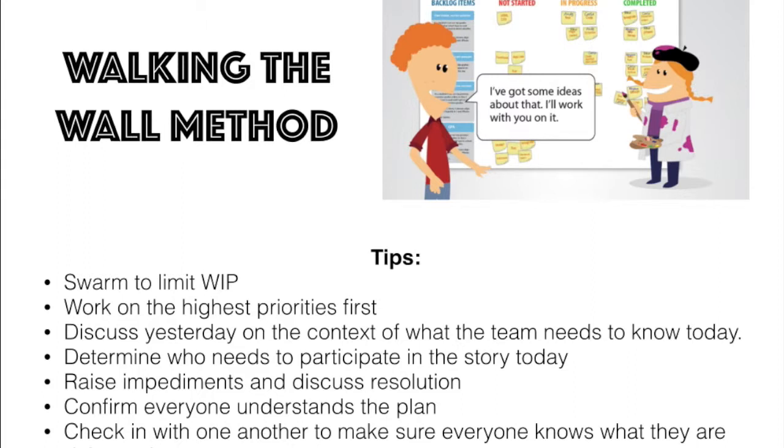And by limiting your work in progress, it's more likely that you will finish stories instead of ending your sprint with multiple open stories. Taking that workload and focusing them on the highest priority stories and closing those as you go down the line helps to actually bring value delivery each sprint.